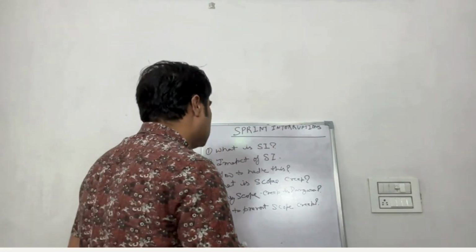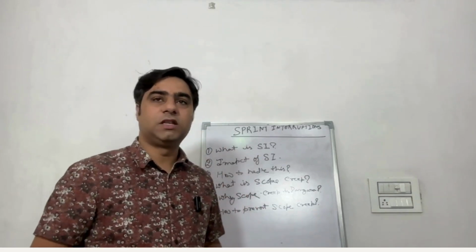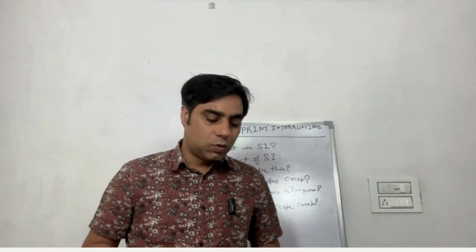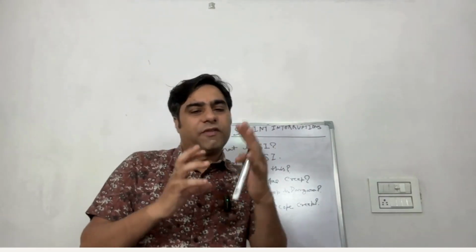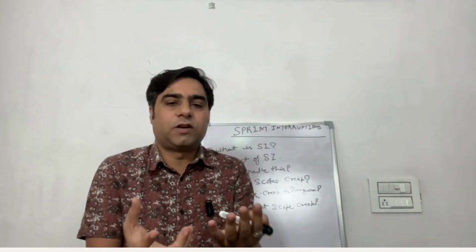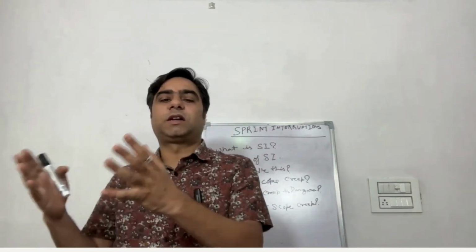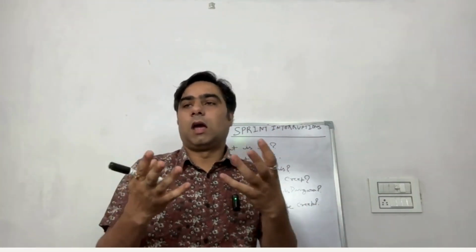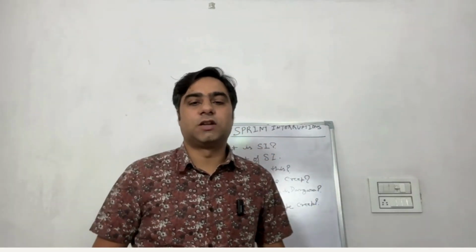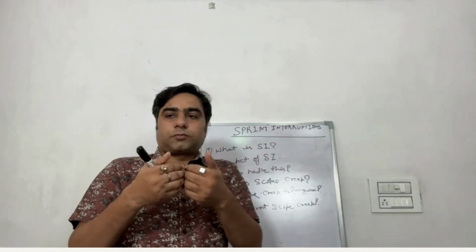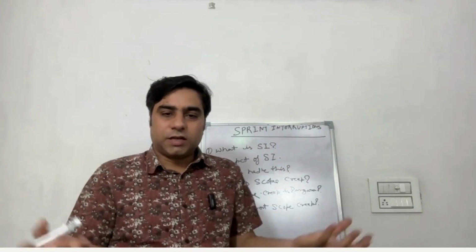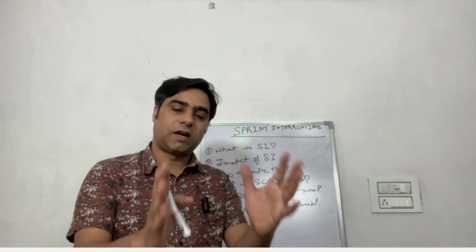The second is use a buffer. What I basically do is, let's suppose my team capacity is 100%, then I take 80 to 90% work for my team and always keep the 10 to 20% for these unexpected events. So that will make sure that we are not going to hamper the sprint scope and everything. So that will definitely help you.